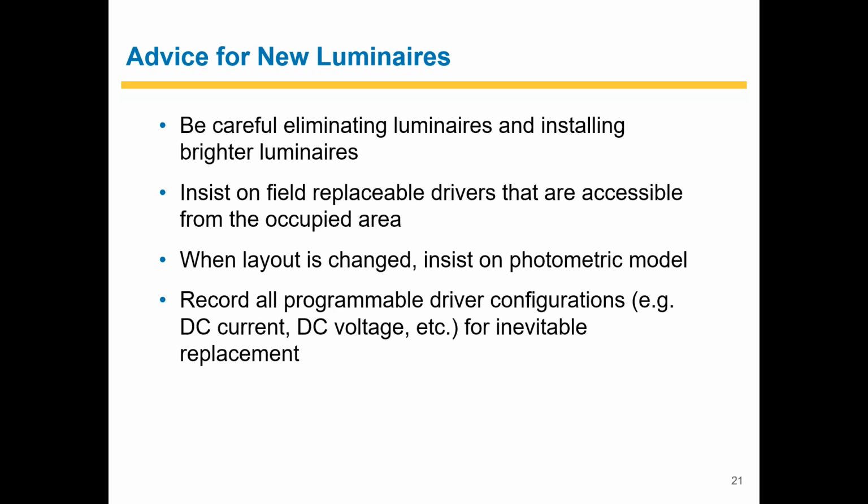If you're going to do a layout change, insist on a photometric model. You might be able to get that from a lighting consultant. You might be able to do it yourself. You might be able to get it from a lighting rep or manufacturer. If you're going to do that, you want to evaluate the new layout and make sure that that new layout is acceptable. You don't necessarily need to compare it to the existing.